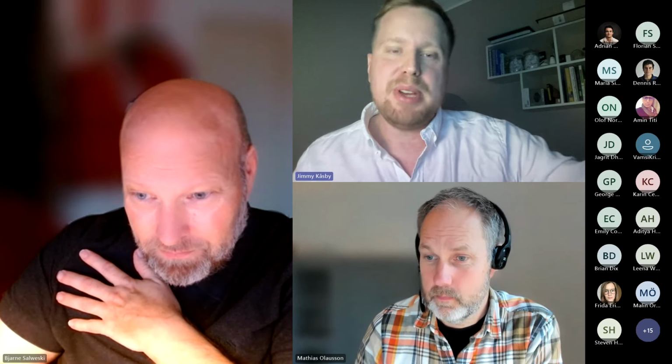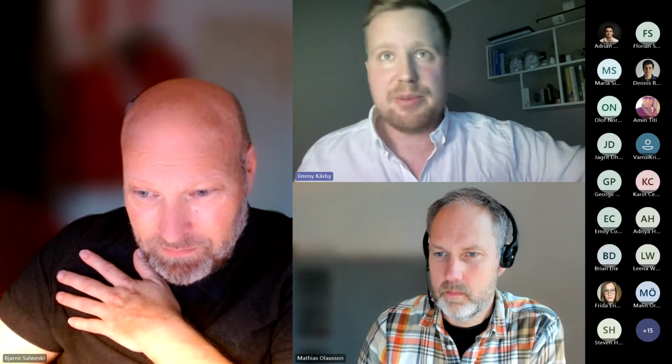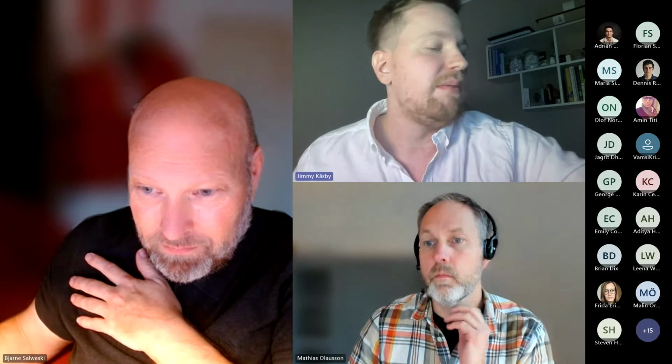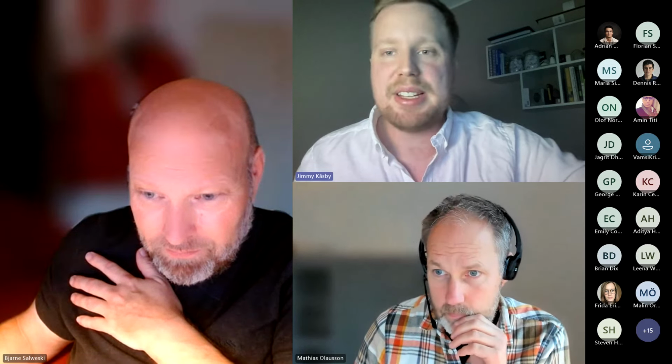Once it gets completed, the business owner assigns whether we achieved it 100%, as an example. If the PI objective is very clear that you want to reach a specific percentage of something, let's say we want to achieve delivery of 10% more, and we manage to achieve 5, that is very easy to see that it's pretty much half. So if you're specific with things like that when you're setting the PI objectives, it makes it easier to set the actual business value as well. But that is done by the ART management team or the business owner, basically, that assigns these values.